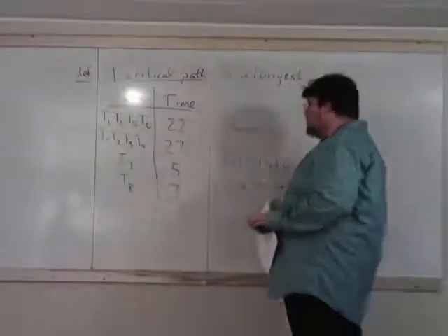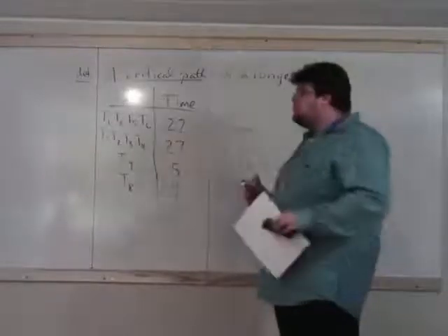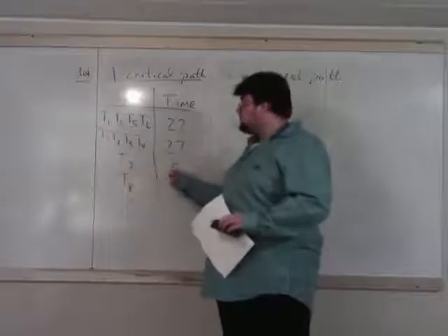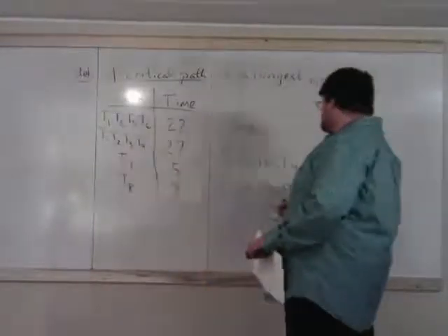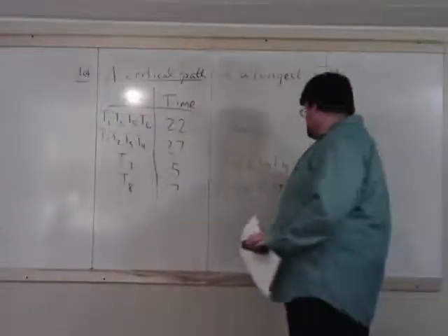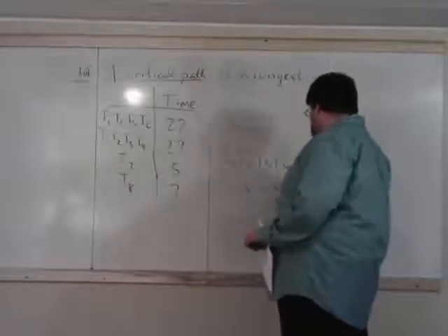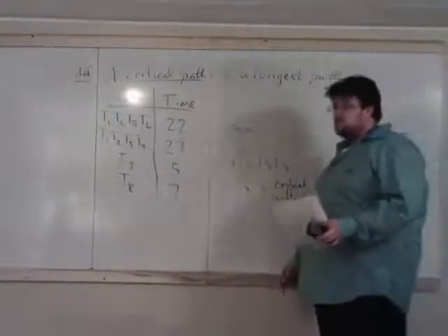In general, for a graph, it's a critical path because you might happen to have two things that are both 27. Like, for example, if T7 took 27 minutes, then there would be two critical paths. And the job would take at least 27 minutes. So that is a critical path, and the time it takes is 27 minutes.